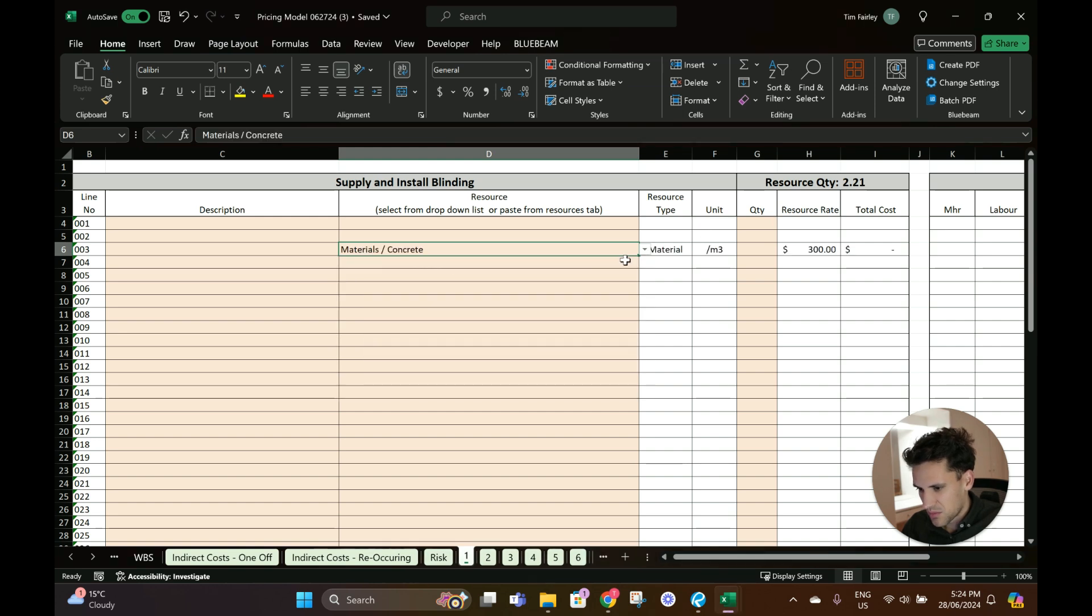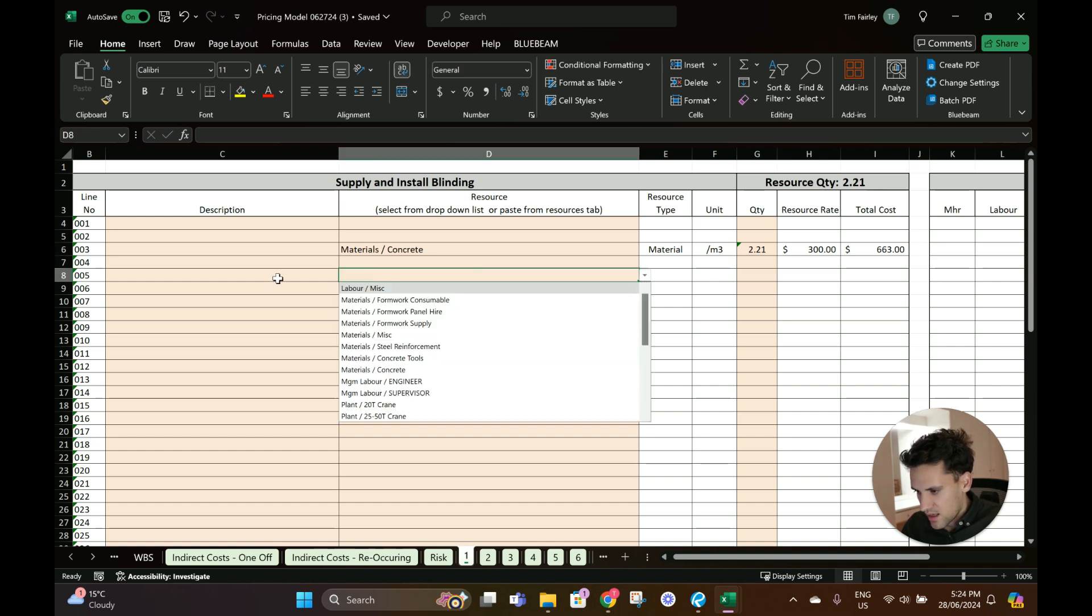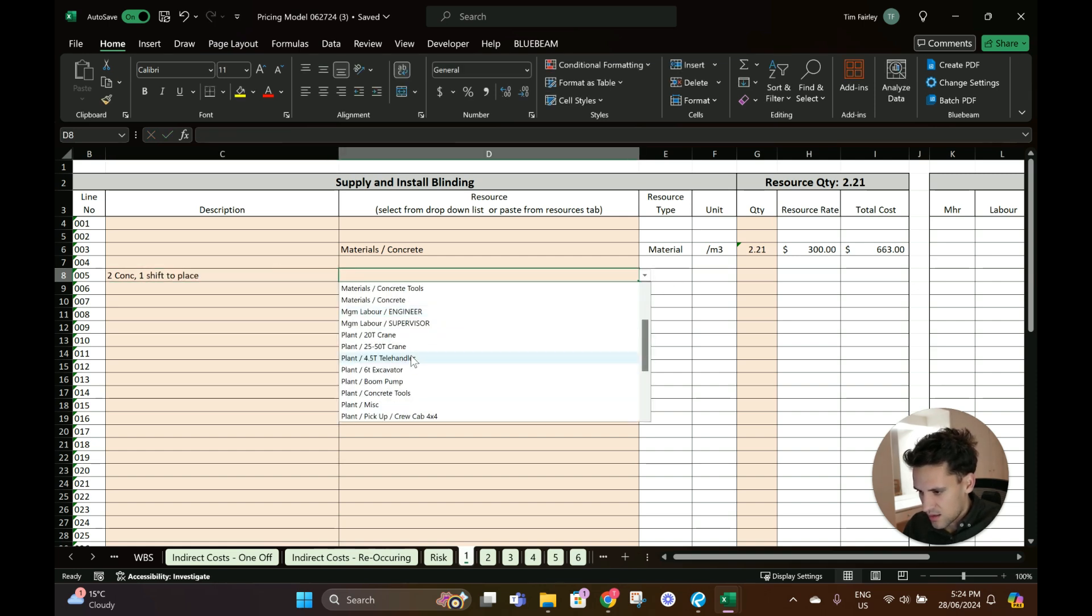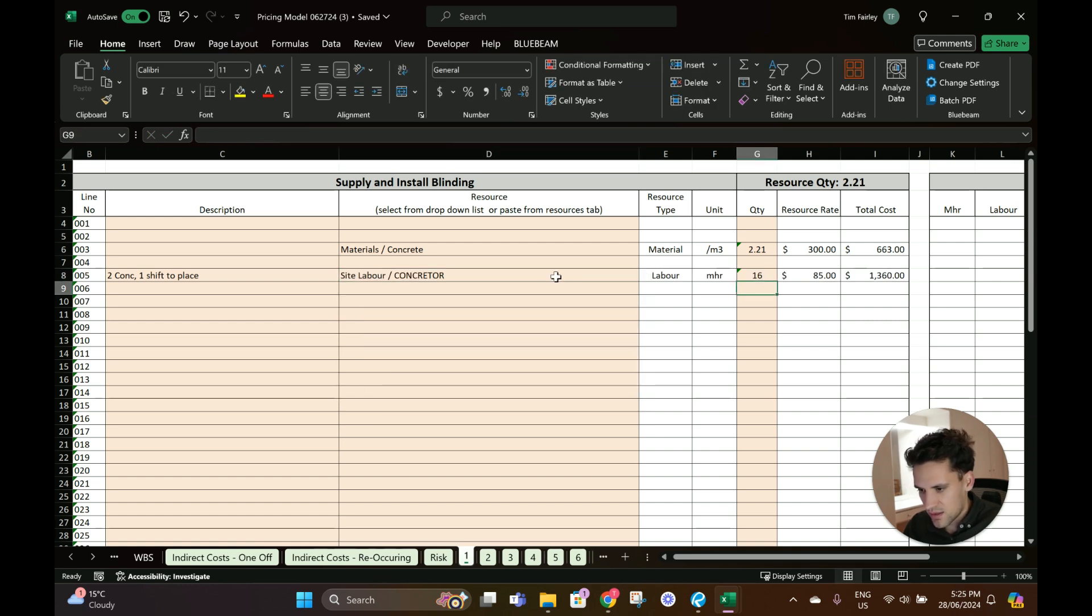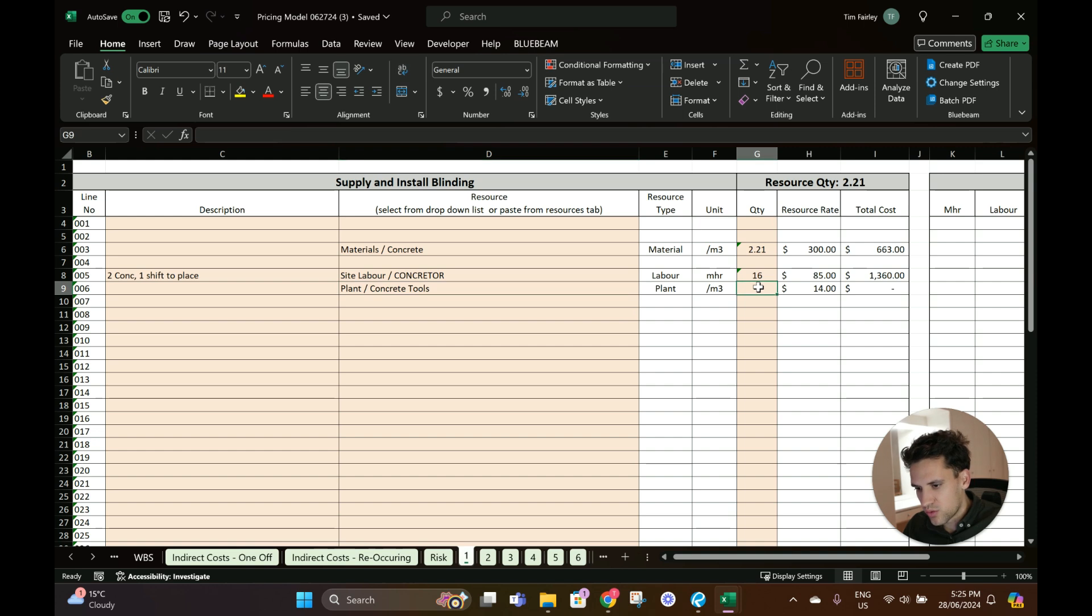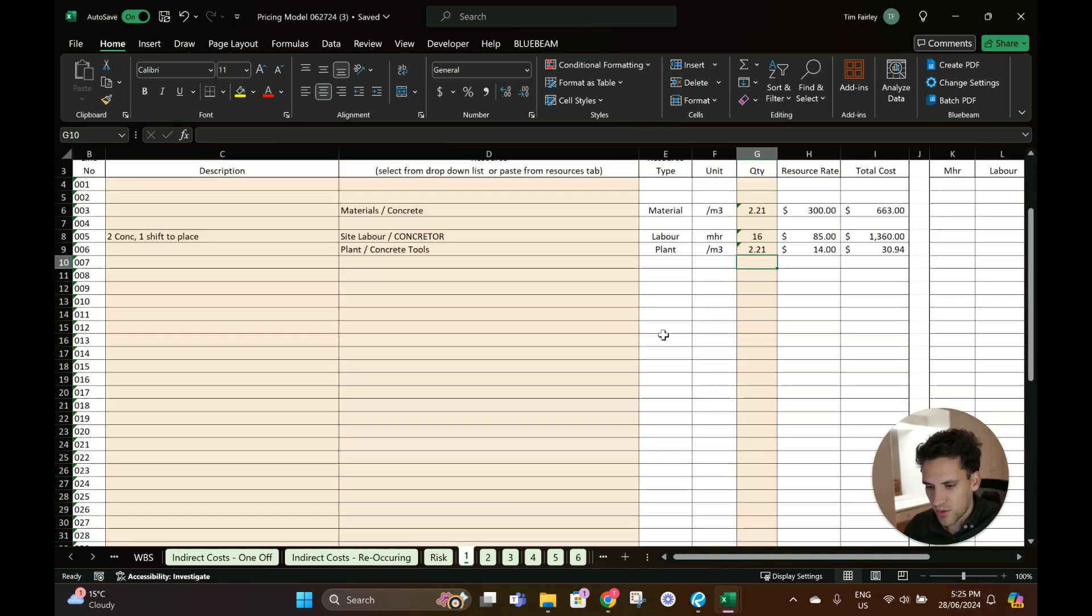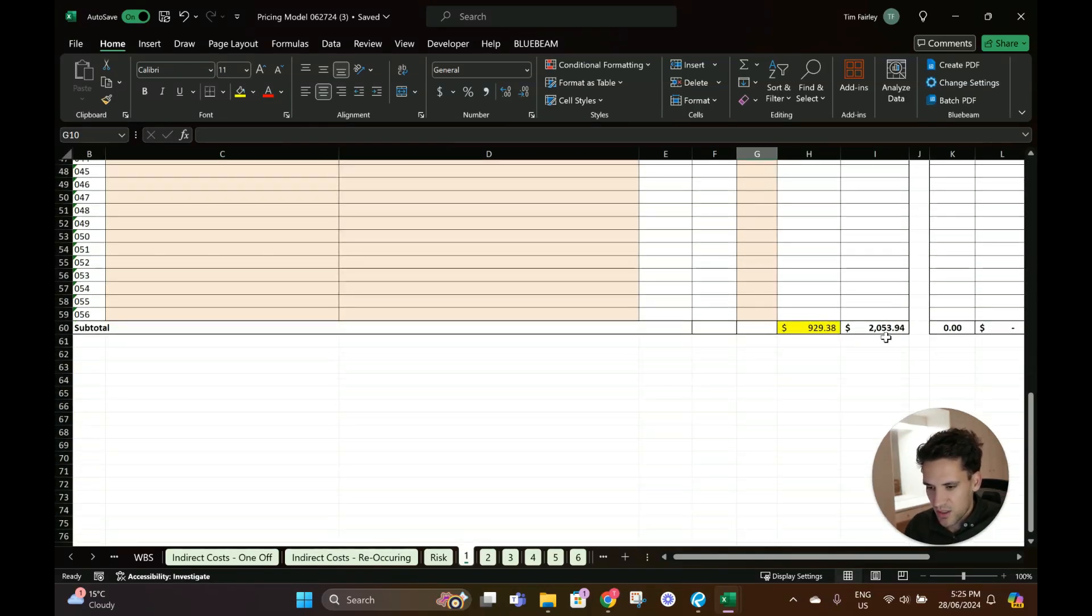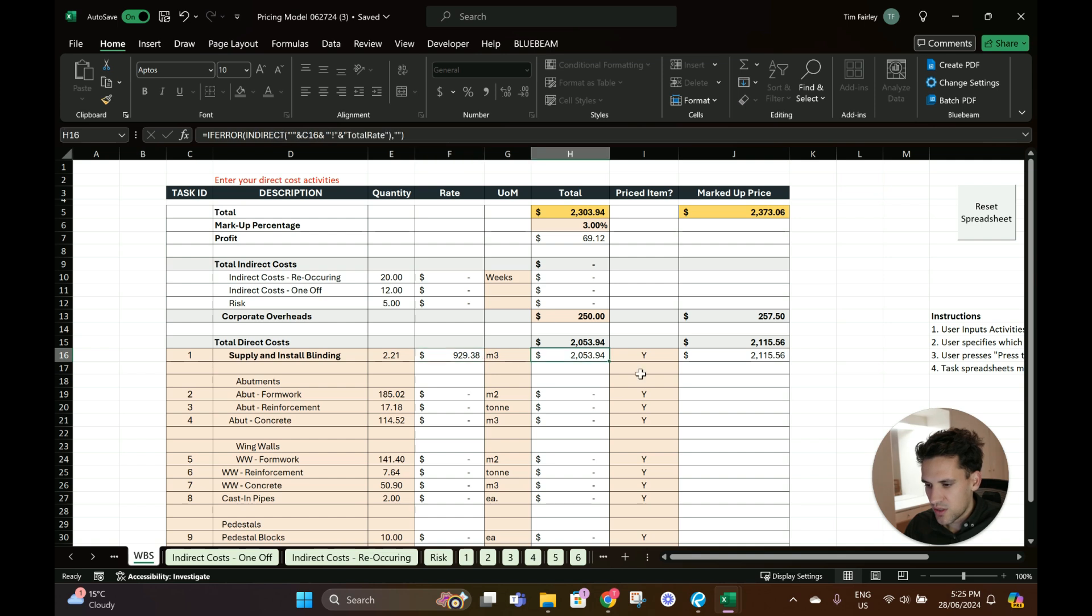Supply and install blinding - we're going to need concrete. This quantity is probably two cubes of concrete and let's say two concreters, one shift to place. So we're going to need site labor concreter, two for an eight-hour shift is 16 hours, and they will need concrete tools at a rate of $14 per meter cubed. These rates we've all come up with, so you have to do this for yourself because these are obviously going to be applicable to where you work. We're getting $2,000 for the supply and install of the concrete blinding.